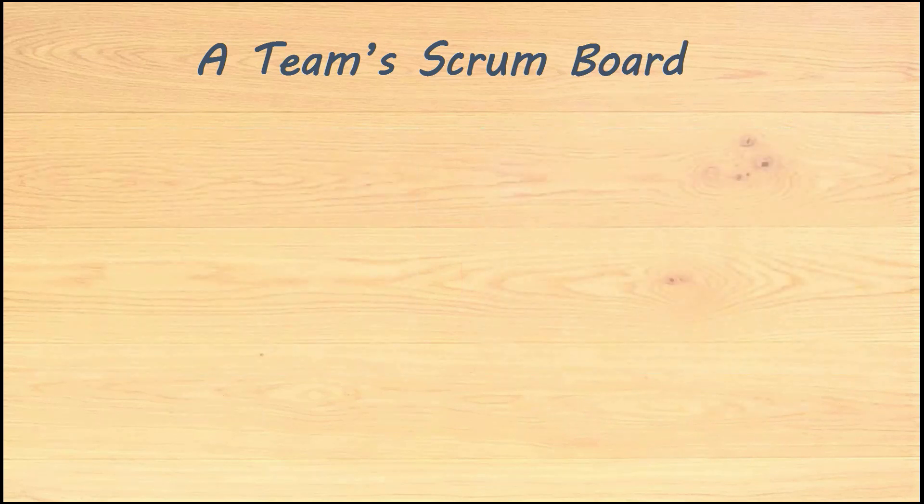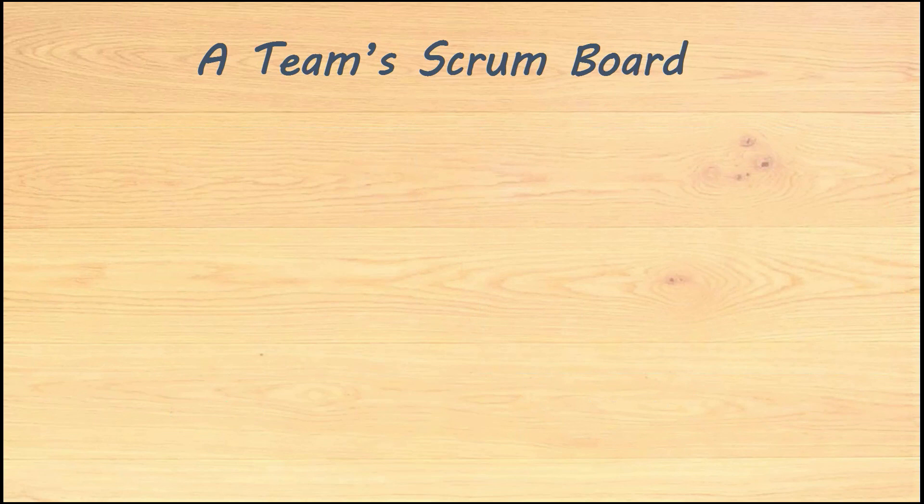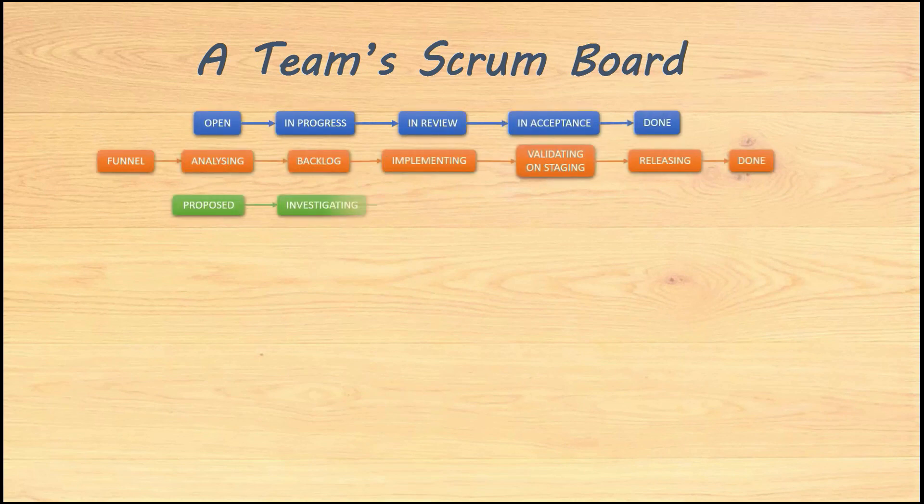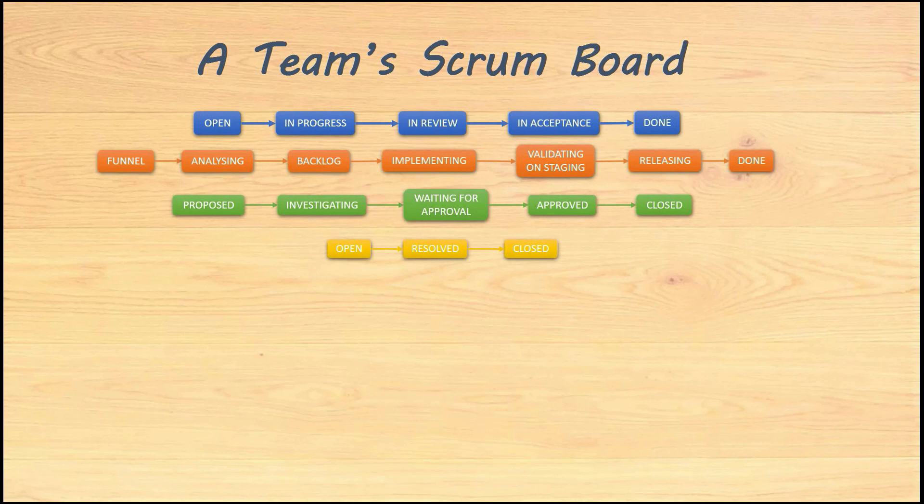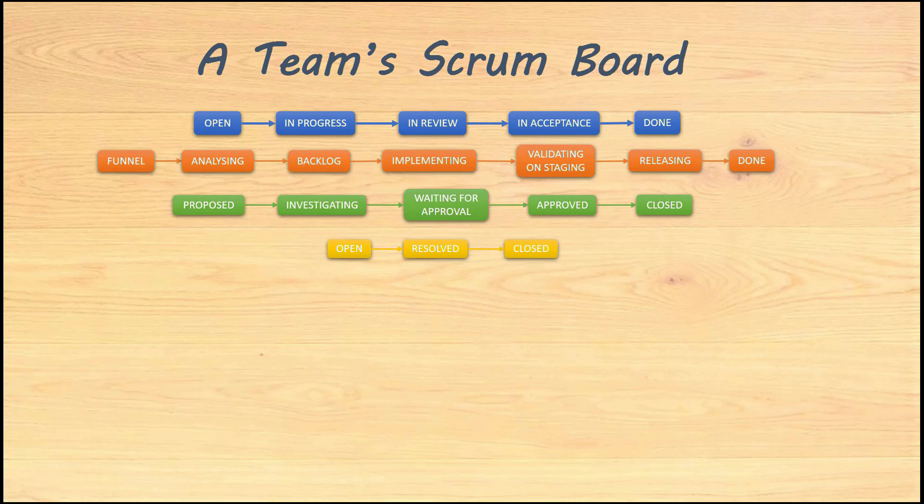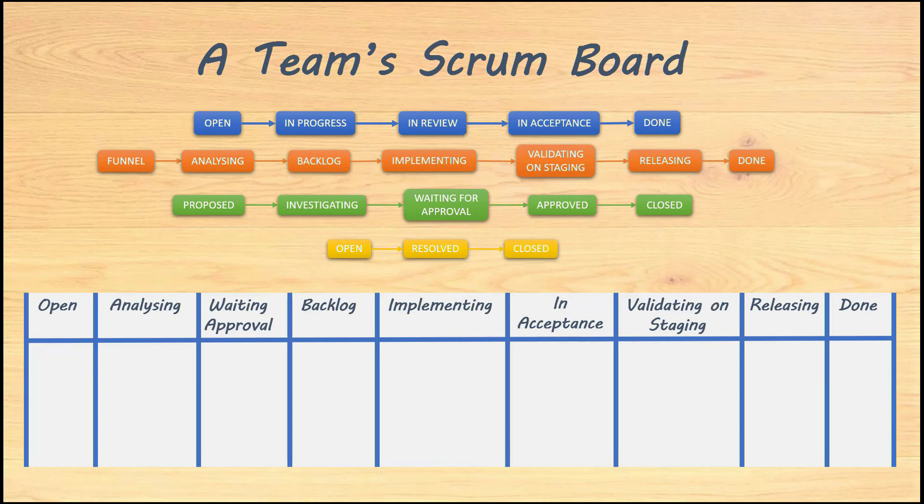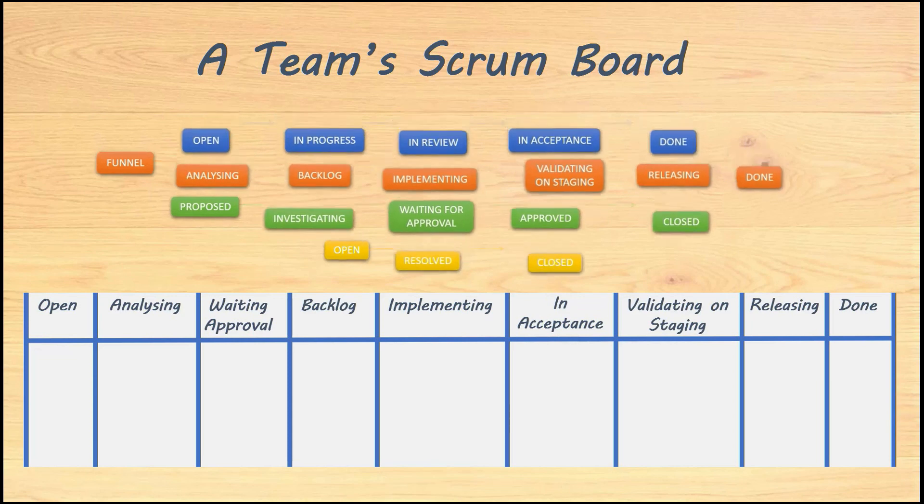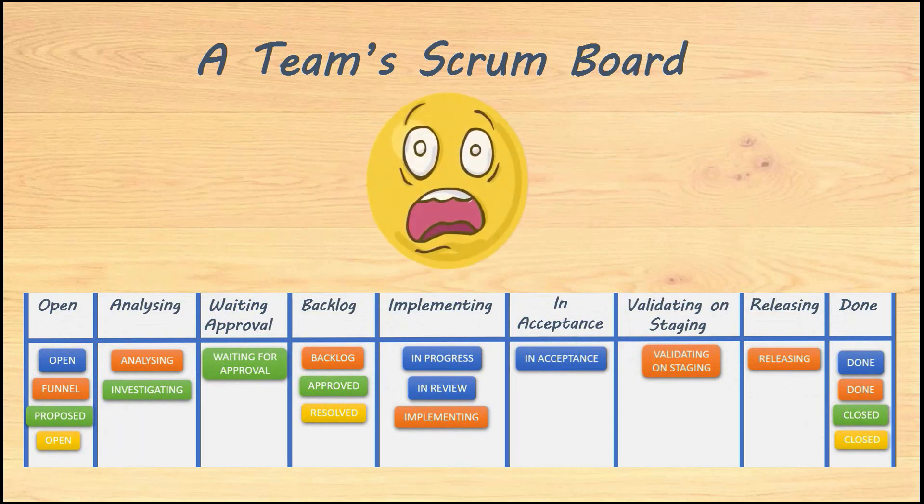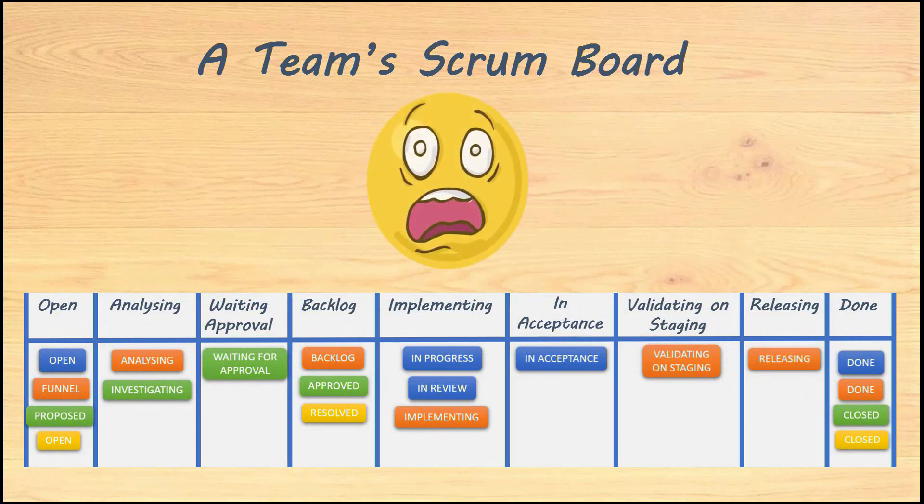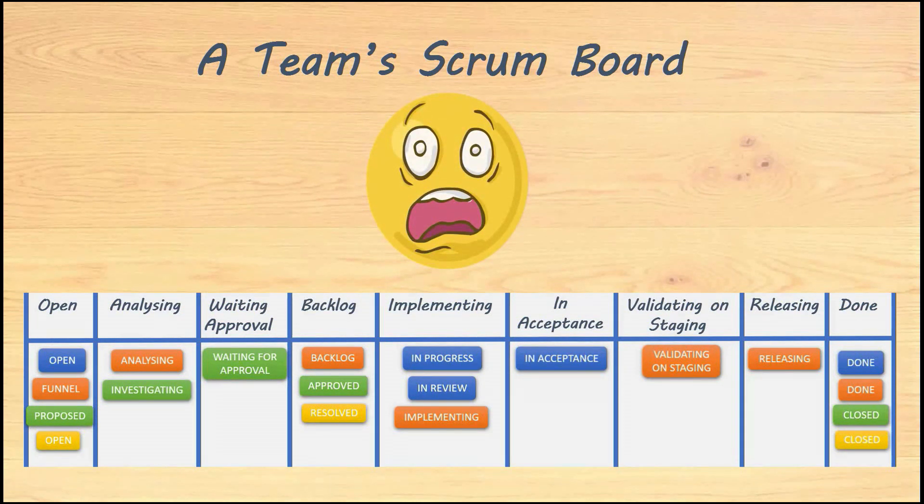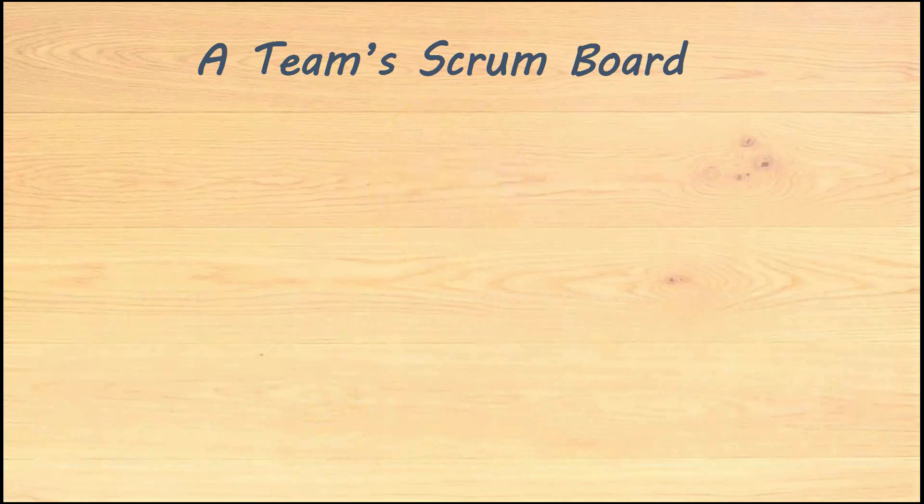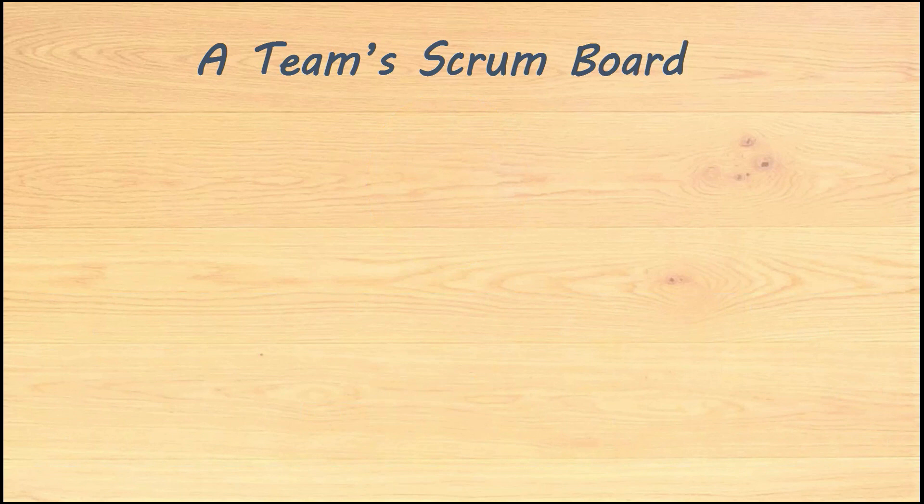When a team builds a scrum board in JIRA it must be clear what are the items that will be part of that board. One of the most frequent mistakes that I see happens when the teams do not reflect about what really makes sense to them to see in their board, and they include such distinct items like stories, epics, risks, change requests, etc. Now imagine that those workflows must be organized in just one board, in such a way that you can clearly see the status of each of them in the context of their life cycle. What will be the next step of each item? There goes simplicity and clarity of reading.